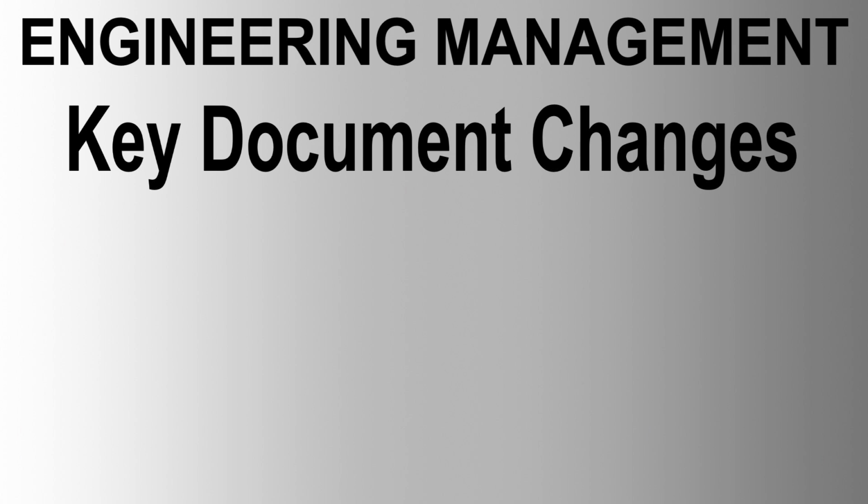1.2. Determine if changes to a key document. Major cosmetic changes or drawing rearrangements for legibility may still require a KDCN if they could be misleading or confusing to users. Originator's LDE to decide if KDCN is not required. If there is any doubt, then use a KDCN.